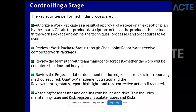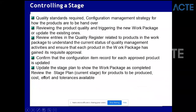What is a product description? A product description is nothing but the requirements - what you need to deliver as per the business case or requirement. Controlling a Stage also covers: quality standards required, configuration management strategy, how products are to be handed over, triggering a new work package or updating an existing one, reviewing quality register entries related to products in the work package to understand the current status of quality management, confirming the configuration item records, and updating the stage plan to show that the work package is completed. It's about governance and making sure quality is maintained.